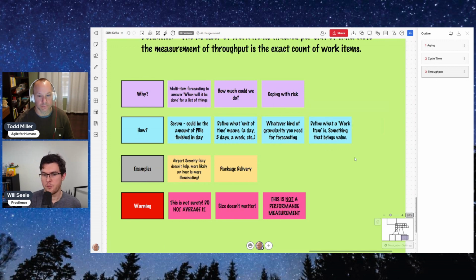Please don't break up your work into its constituent parts. Like, don't Gantt chart this stuff and then say that each of those individual little tasks are the things that you're going to track. Right? Analysis work by itself is probably not valuable. Just coding the thing, but not testing it, not releasing it, is not valuable. On the other hand, a new feature that is complete is hopefully valuable.